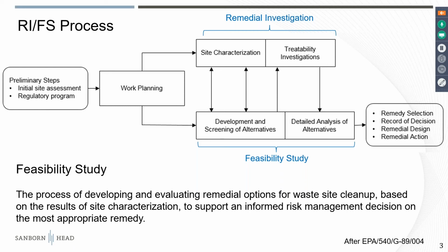We're basically looking to come up with the most appropriate remedy based on our evaluation of remedial options and considering risk management decisions as well. And at the end of the process, you come out with a selection of the remedy, and then the more formal process, if there is one involved, with a record of decision, which then allows you to kick off into the remedial design and remedial implementation.